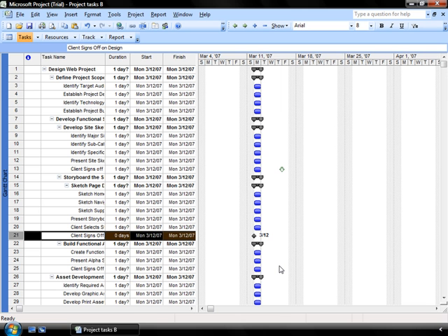Now that you have those two indicators in your Gantt chart, you can mouse over them ever so slightly to see the information that quickly flashed up on your screen, the information that's identified underneath the indicator, so that you can see what you're doing with that. If the task finishes after a deadline, as you see here, the symbol is going to stay. If it finishes before the deadline, that symbol will disappear.